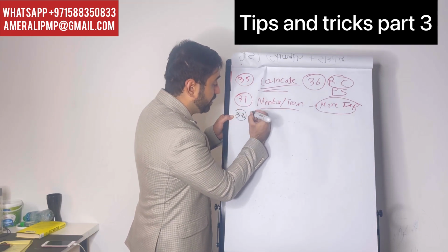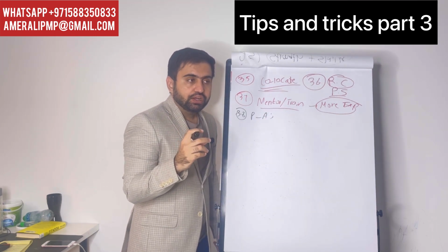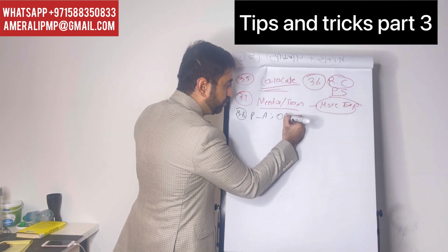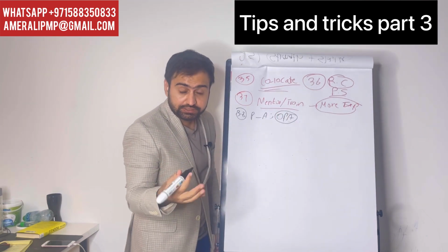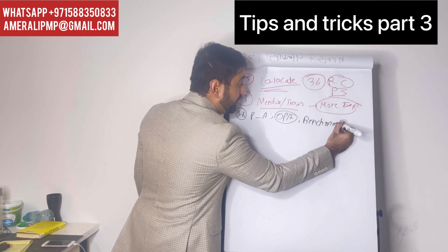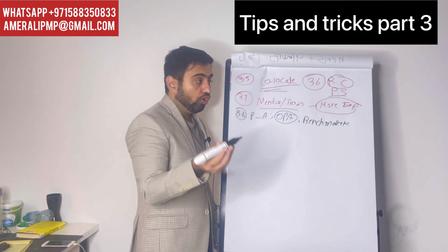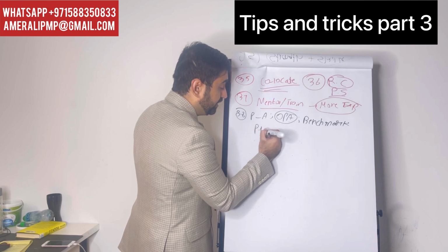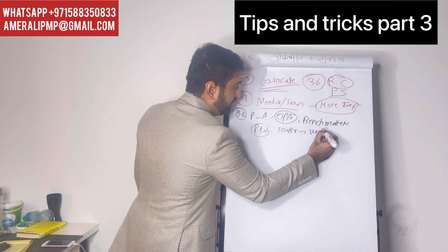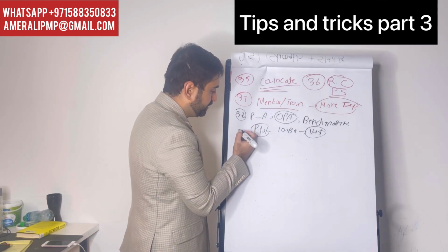When you are moving from predictive to agile, or agile back to predictive, how would you convince the people? You can convince them with the past projects of your organization. If your organization is new, you can benchmark and show them other market projects which have produced good results because of these practices. Or you can do a pilot project. Let's say the organization is a $100 billion organization. You do a $1 million project, show that it succeeds, and then continue in the same way.